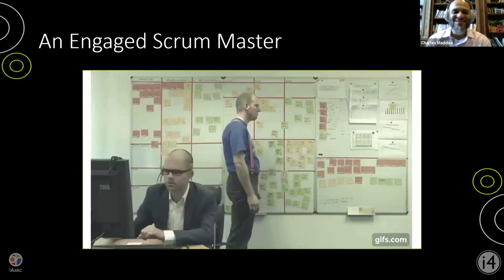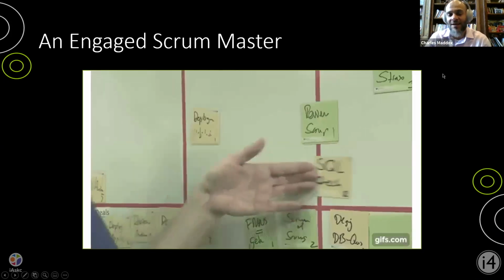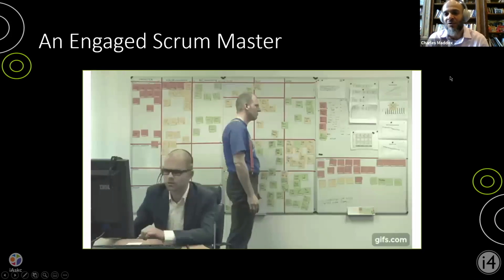So this is comical, but it's showing that Ivan is definitely engaged. He's passionate about this. What's actually really ticking Ivan off is the guy moving his development card and calling it done. And you see that guy looking around. He didn't meet the definition of done, to Austin's point. He probably didn't have a code review, or some type of review, or meet some certain criteria. But he's like, I'm calling my stuff done. I want to be done. I want to go home.